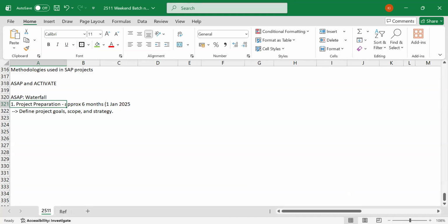It doesn't mean that they will be able to start using SAP from January 2025 itself. This takes a minimum of 2 to 3 years for them to complete all the activities. Only after 2 to 3 years can they use it in a production system. Until then, what we do exactly, we are going to understand in all the phases. We'll go through each and every phase. Depending on the project size, it can go beyond that period also.